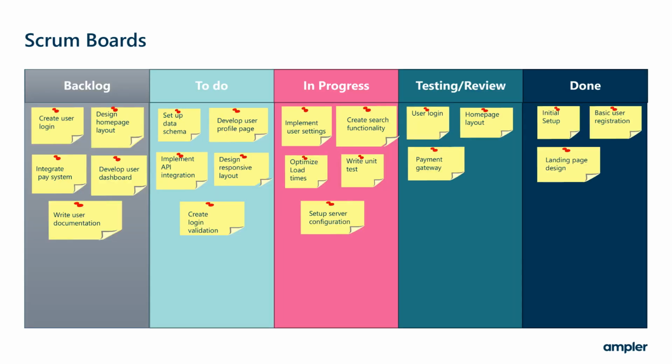Another good tool for agile or iterative projects is the Scrum board. This management tool is designed to support agile methodologies such as sprints. The main point of a Scrum board is to help the project team focus on a limited number of tasks at any given time. The board is divided into columns such as to do, in progress, in review, and done. Tasks move horizontally across these columns until they are marked as done.